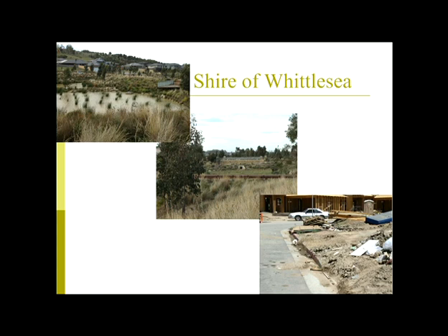If there is sediment in there, then before the builder or the developer hands over responsibility for these wetlands to the council, because maintenance of those areas does become the responsibility of the council after the development is complete, the developer has to dig them out and start again, reset them.